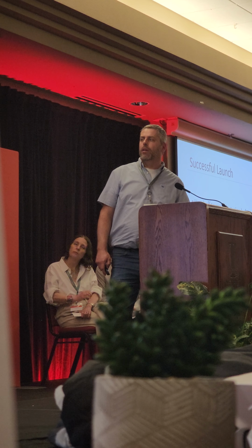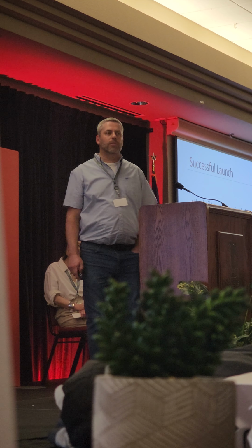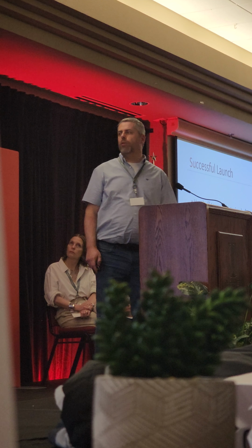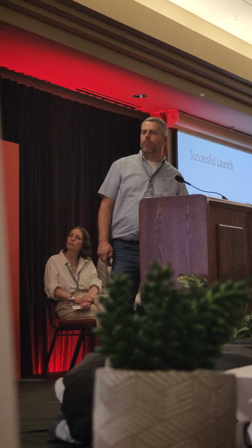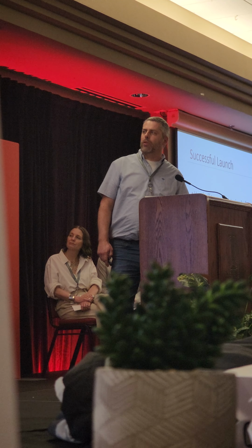The goal is to have clear work instructions, routings and BOMs, and a yield of a new item above 98%, and that's not just during product launch, that is to be able to sustain that in manufacturing. If all of those items are checked, then we have a successful product launch.